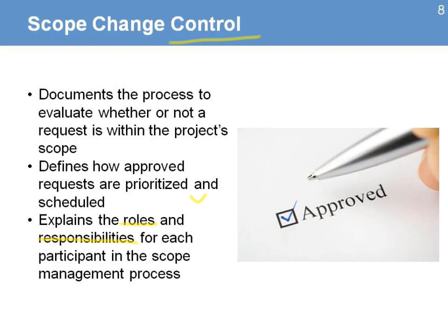We first review the request, we analyze it, we look at the impact and the benefits of that change in the project, and whether there's going to be an impact to the schedule and the budget, and there is a process of approval. Depending on the levels of authority, sometimes it would be the project manager or even all the way up to the donor who will approve that change. But we need to have something on the project that allows us to manage those requests for changes.